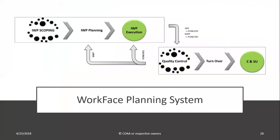In addressing scalability regarding work phase planning for all project types and sizes, we've expanded the IWP process found in the RT272 documentation. The diagram here illustrates a planning system for work phase planning, which breaks down the construction stage into five separate phases. This work phase planning system is designed to work like the IWP process in RT272, but recognizes that smaller projects require team members to wear many hats, whereas RT272 provides a functional delineation.